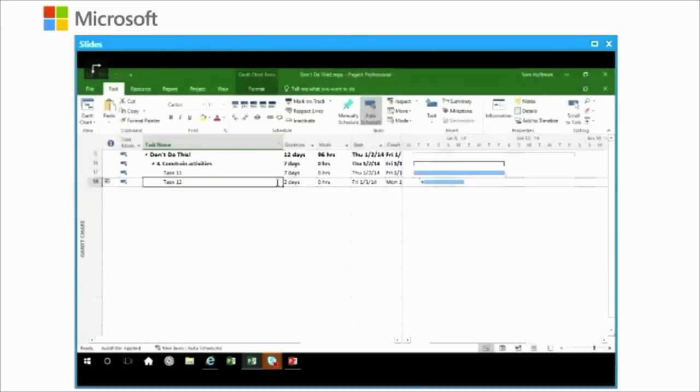Constrained activities will be honored before sequencing calculations in Microsoft Project. So beware of that. And what you just saw is, if you see a lot of these boxes on the left-hand edge of your task sheet, you may have some schedule issues that you're not aware of. So I encourage you to go back and have a look at them. Let's look at the next don't.